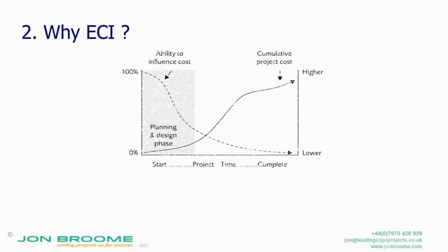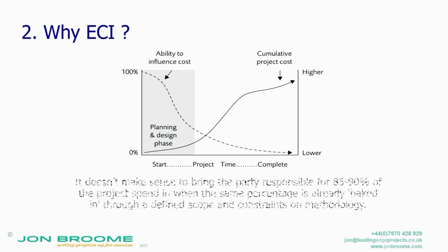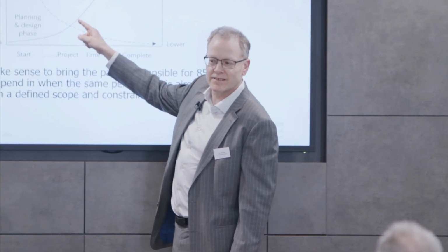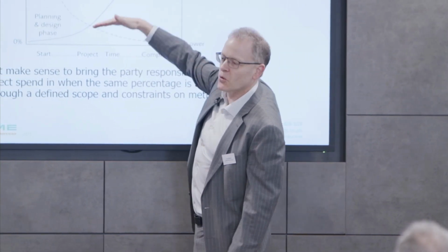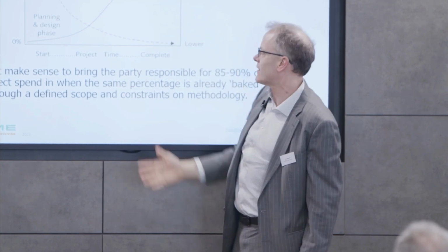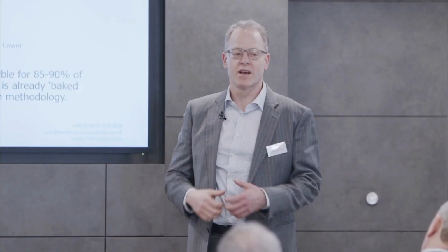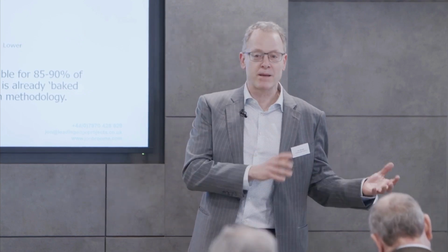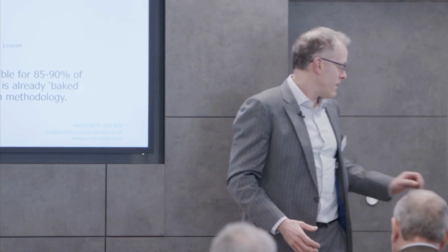First of all, why ECI, early contractor involvement? Well, essentially it's this one. It just does not make sense when you think about it to get someone involved in, say, here, when they're the ones responsible for this much spend, yeah? That's the fundamental reason to do early contractor involvement. Get the people who have the expertise and control the resources involved before they start spending the big money, yeah?